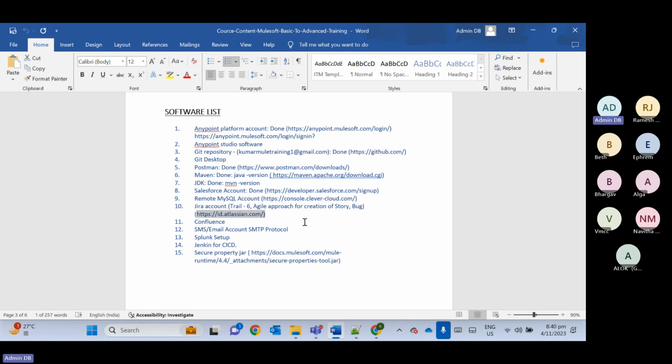In the waterfall model, we have multiple phases: requirement gathering, development, testing, deployment. First we work only on requirement gathering. Once all the requirement gathering is completed, then we go for development. Once all the development is completed, only then we go for testing.